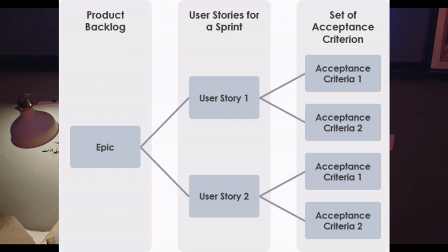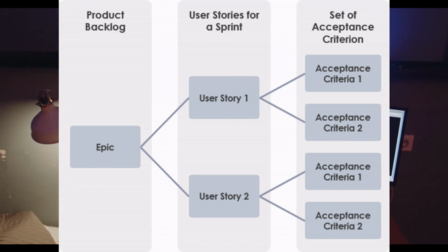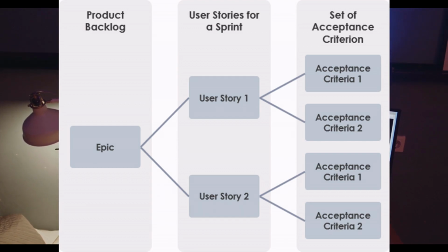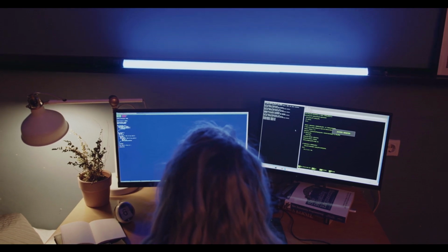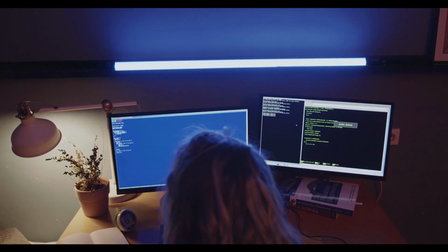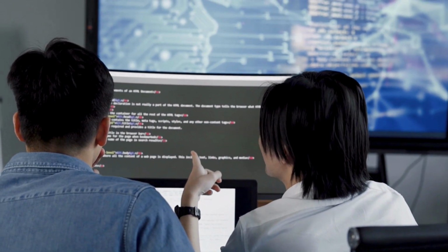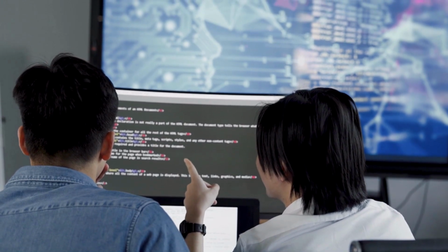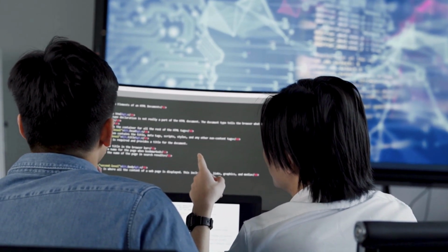The backlog of all these entities is handled by a business analyst paired with the product owner and with the client. Backlog is not just a list of some tasks, it is a prioritized list. That is, the product owner prioritizes tasks, which means that some of the tasks must be completed first. Thus, at the output, the developers receive stories already sorted by importance, which the developers further break down into tasks.